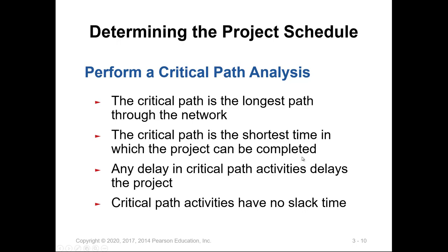To perform the critical path analysis, we need to understand that the critical path is the longest path through the network, and that constrains the project length or duration. The critical path is the shortest time in which the project can be completed — we cannot crash it further because it depends on these critical activities to be finished. Any delays in the critical path activities will delay the project. Critical path activities have no slack time, and that's why they are critical.